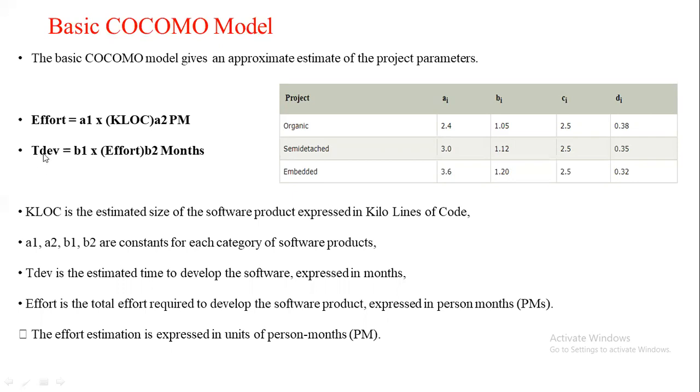And development time is equal to B1 into effort to the power B2, expressed in months. Here A1, A2, B1 and B2 are constants.